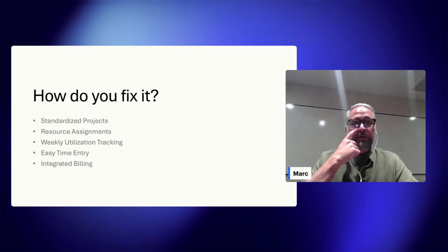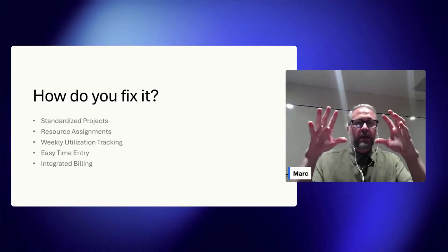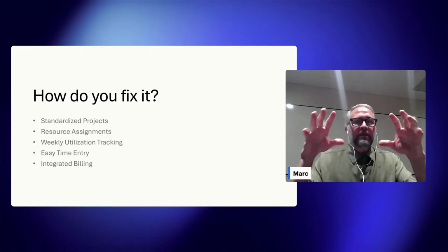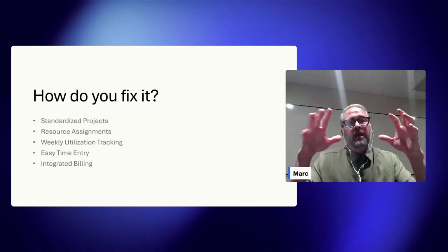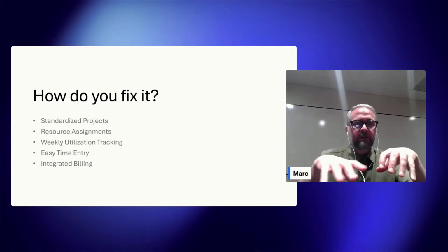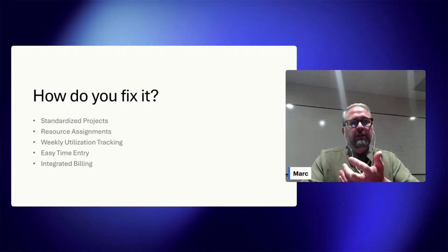And then naturally you want to integrate all that billing. So you want to be able to have a process where you get the time entry entered really, really simply. That time entry would be based on resource assignments. And then that can get approved with a simple process. Those approved time entries make it to an invoice. That invoice can be reviewed before being sent, ideally, typically on project close.